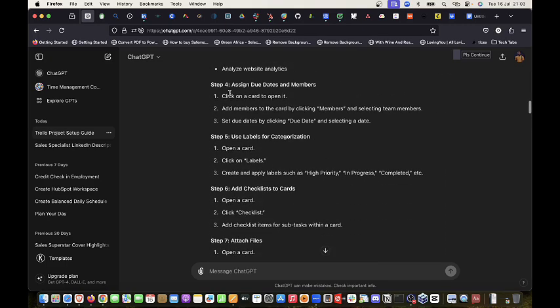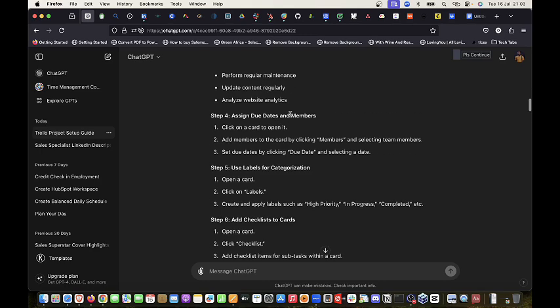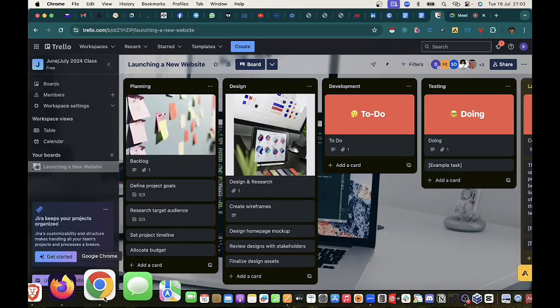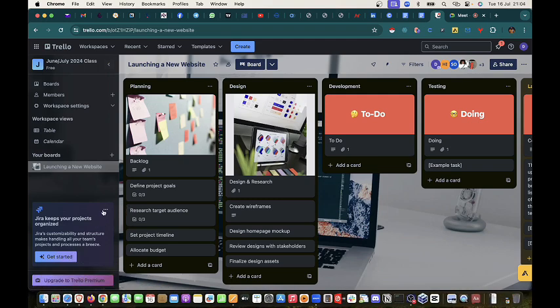Now it says assign due dates and members. These are the next ones I'm supposed to do. Now, due dates are, let's say I give you a task and I want you to be able to do it. Let's say this project of website design is a project that we give 8 to 10 weeks. That's what we want. We want that before 8 to 10 weeks, we have been able to finish this project. Now, every single deadline or timeline you assign to each task must fall under this 8 to 10 weeks.